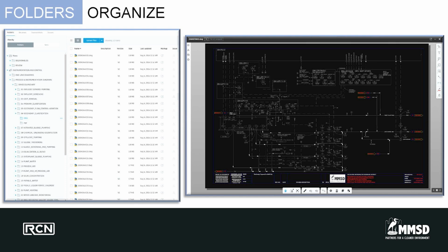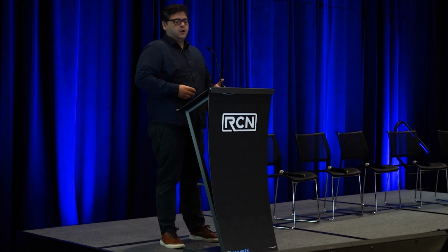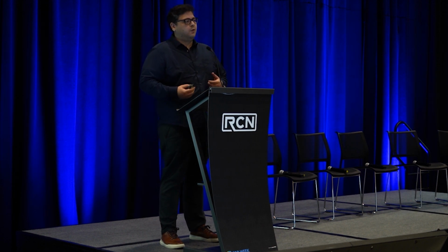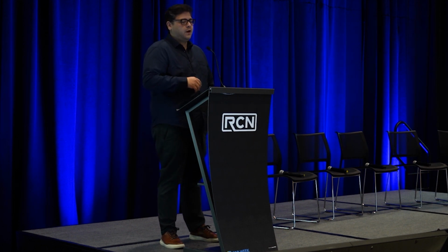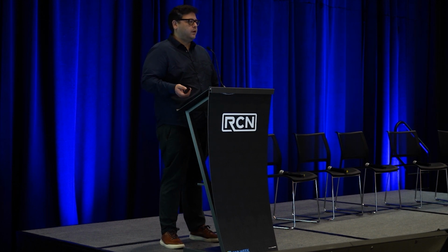We also host our master P&IDs, or process and instrumentation diagrams, in ACC. This gives us the ability, and our SPMs, our senior project managers in the field, to update and mark up these P&IDs with real-time changes. One of the biggest challenges with these is that our plant operator, Veolia North America Water, will make changes, and sometimes we don't know about them right away just because they weren't part of a larger contract. And so we don't see these changes, and that's the red-lined electrical drawing that you find in the panel. So if one of our SPMs is out there, they can mark these up, publish them, notify us, and we can update them in real time before they're even back in the office.